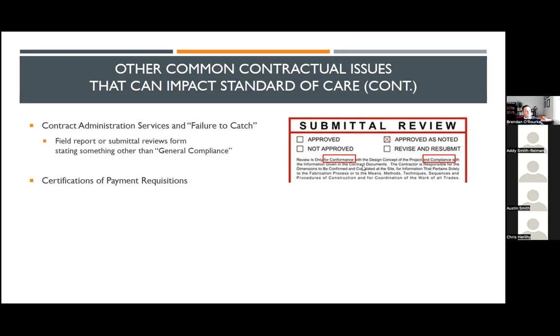that spoke to reviewing the submittal by the GC, and the language says approved, but implicit in that, or expressly stated in the language on the stamp, is that review is for conformance, and essentially goes on to read review is for compliance. If you look back at the contract that was being used in that instance, the contract says general compliance or general conformance.